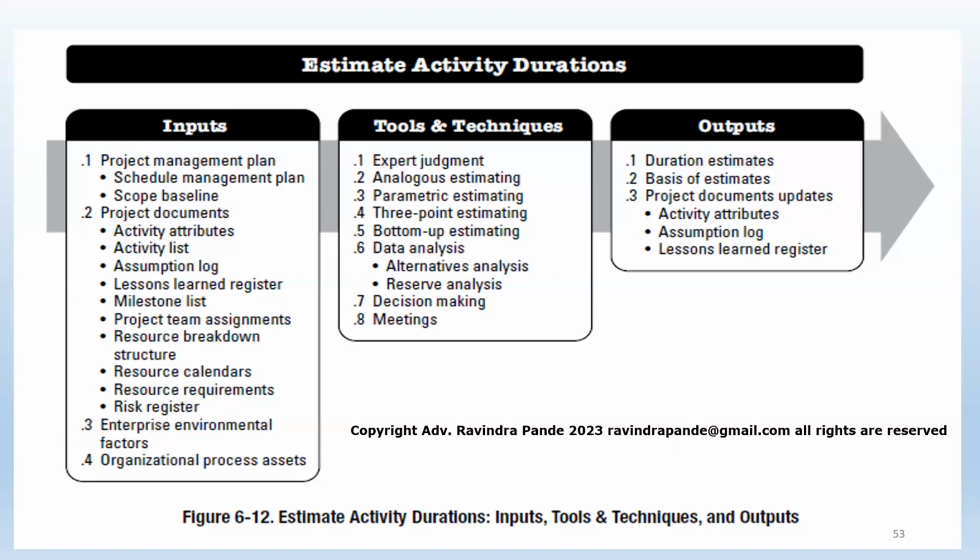Then I have a resource requirement in case I do require any additional resource. This is specifically for when one or two resources are going on holiday, they have a planned approved leave, or they might not come to the office for the next few days due to health challenges and so on. I might require extra resources. So how can I process this proactively? As the resource manager is external to my team, I need to put in the request proactively.